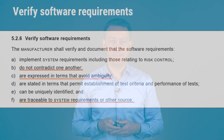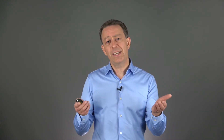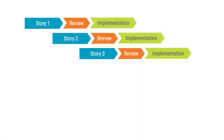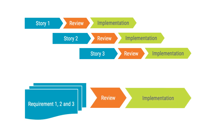Now let's make it more tangible with an example about verification of requirements requested by the standard. You need to verify the quality of your requirements by, for example, verifying that they do not contradict one another, are expressed in terms that avoid ambiguity, and are traceable to system requirements or other sources. If we start with a Scrum approach, this requirement would be fulfilled in many steps - when eating an elephant, take one bite at a time. The wordings might be different compared to the standard, but you certainly don't want contradiction and ambiguities in your stories. You verify software requirements on a story-based level instead of verifying your complete backlog of requirements. If we compare with a waterfall approach, you typically aim for having nearly a full set of requirements before you go for review. In this example, you will not verify as frequently as you do in Scrum, but you will spend more time in every review. So you have two different methods to get the same job done.